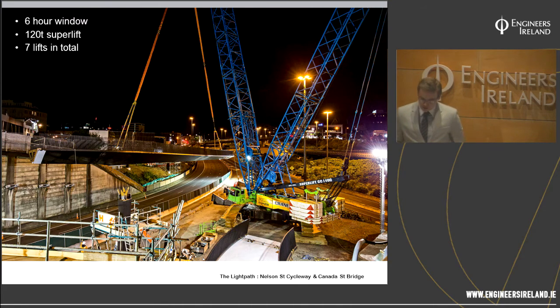To make the first lift a bit more complicated as well, there wasn't actually enough room on site for the bridge or for the crane to attach onto the super lift that it required. So what actually had to happen was it had to pick up the beam, swing it out over State Highway 1, and then slew about 2 or 3 metres, let's say, towards the screen, swing around, and then attach onto the super lift. There wasn't enough room on site to attach the super lift for the initial lift.